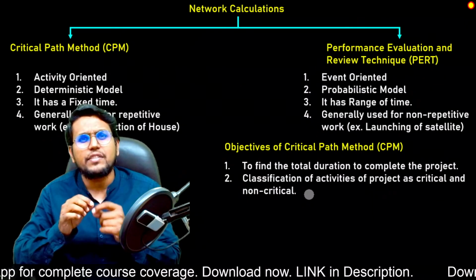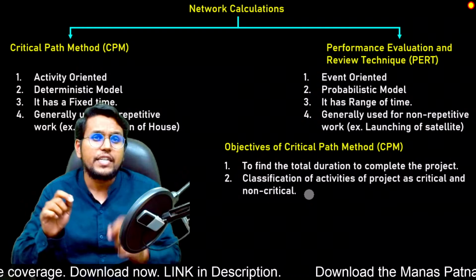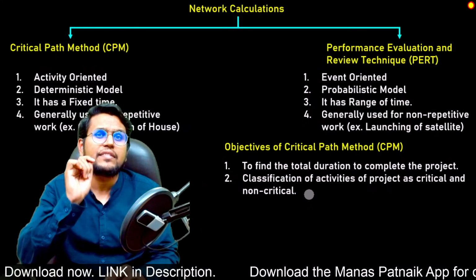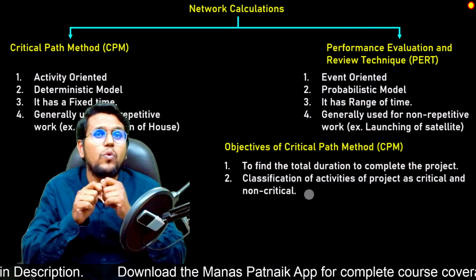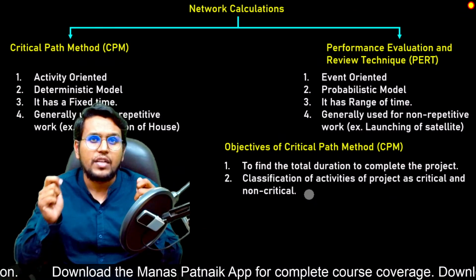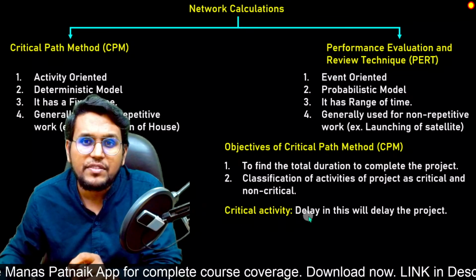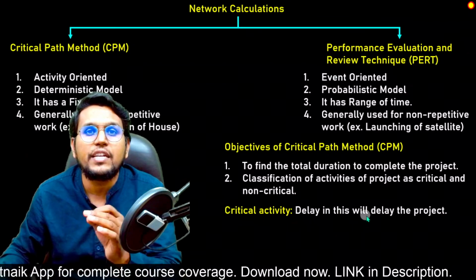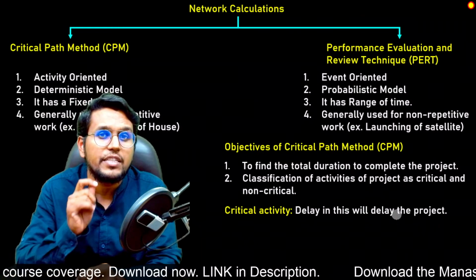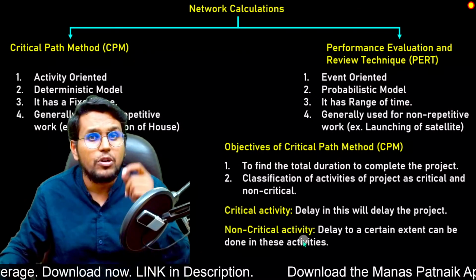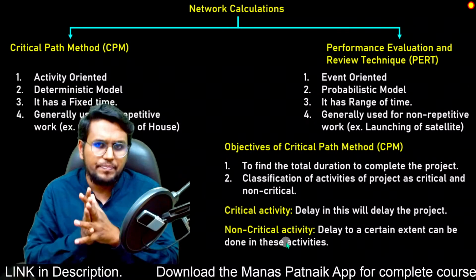Now, critical activities have extreme significance when we are drawing a project. That is, we cannot delay the critical activities. If we delay any of the critical activities, the whole project time will be delayed. We will see how. Any delay in the critical activities will definitely delay the project. And when we are talking about non-critical activities, a certain amount of delay can be done.